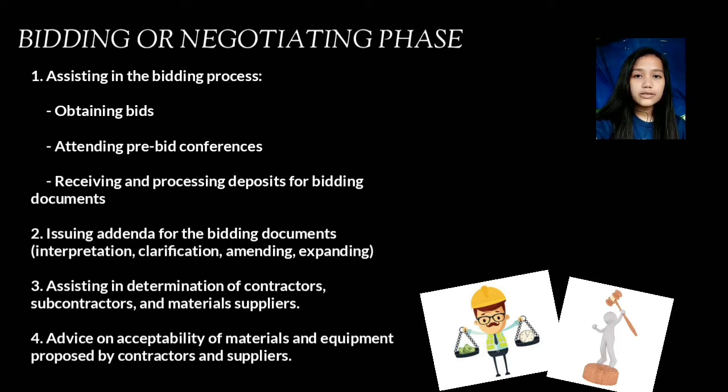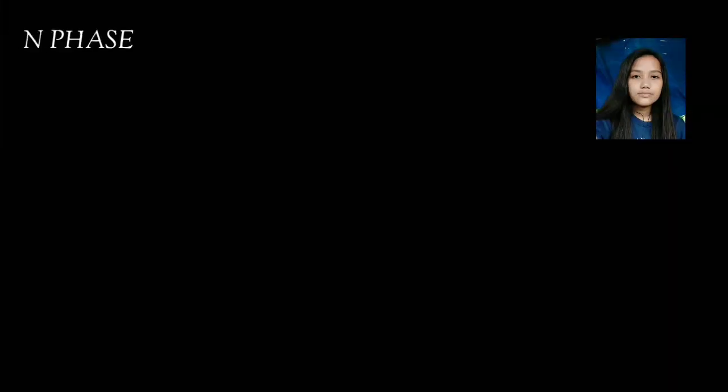by contractors and suppliers. In the bidding and negotiation phase, services are estimating costs to construct the project. It requires competitive bids from multiple subcontractors for specific trades, especially on clarification of bidding documents. It is most important. This stage happens simultaneously with the implementation process.